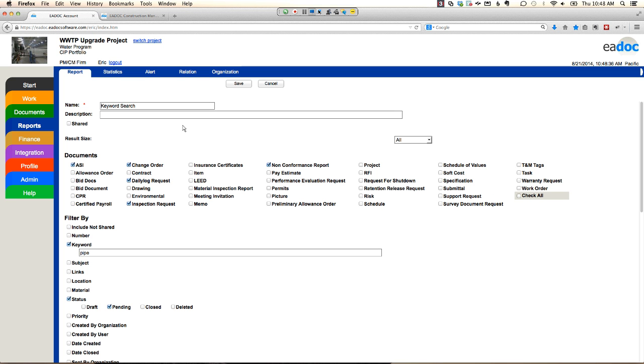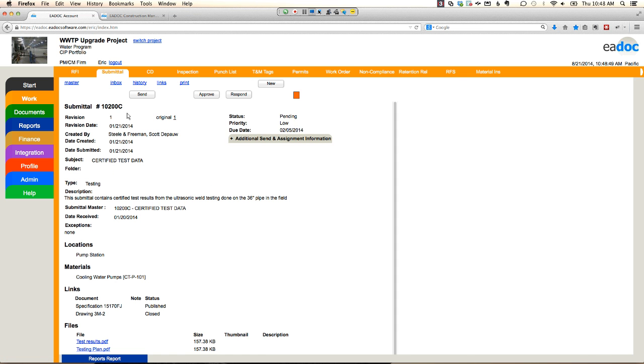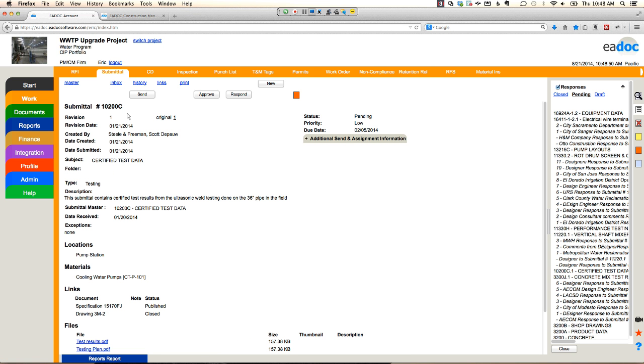The project was one contractor and one project team, but it was being executed under 5 OSHPD permits, so they had to tie each piece of documentation to the specific permit. When the inspector came on site to inspect against a particular permit, they could run a report giving them all the approved submittals, RFIs, and change orders related to that permit, and then link their inspections with that permit in the system. Okay.